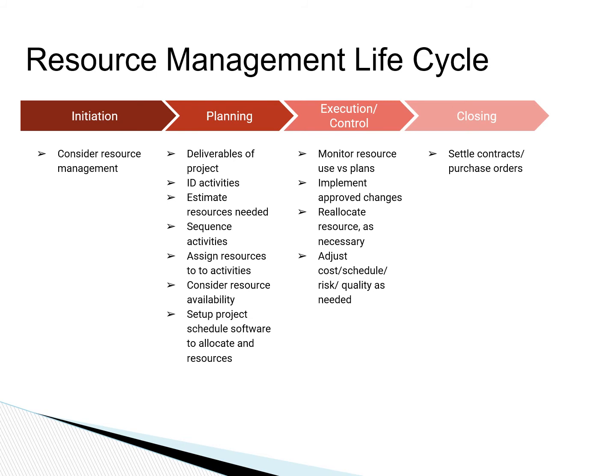And we also need to consider the availability of resources while we are planning our project schedule, and those are all input to our project schedule. During execution, we may need to reallocate resources, move resources around to areas that are falling behind to help them catch up with the rest of the project.